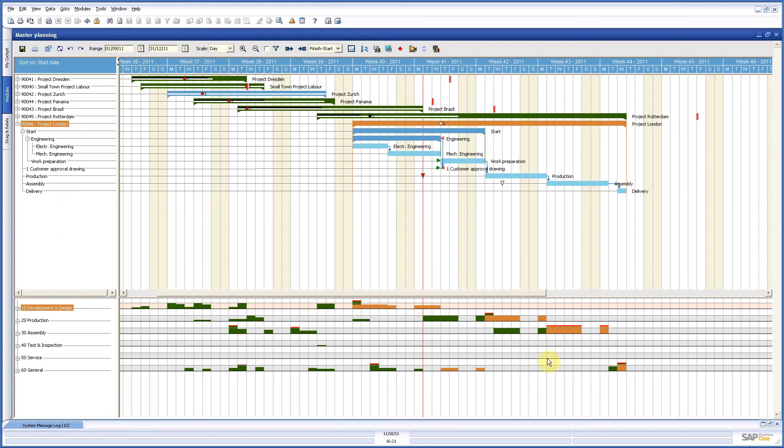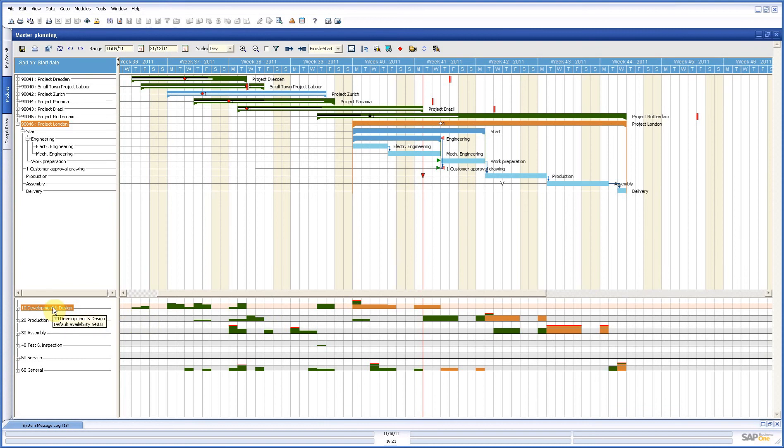Now, if we see this, how can you solve problems in this case? First of all, you can say I do nothing. I know I have some buffer in my company and it is not too much. I can do it. That is fine. Second solution you can use is that you get in more people in a certain time. And then the system says fine, then you can do that as well.